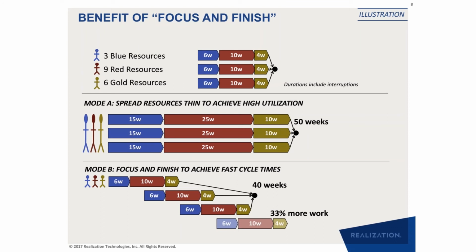what we should strive for when we are creating a project plan for a single project in a multi-project environment is to achieve the duration that is dictated by the critical path. That is how we should think about resourcing a project. And again, critical path, you said, duration that is dictated by critical path. Is that correct? Yes, we should try to achieve that duration when we do the project plan in critical chain. Right? Which means having enough resources so that you don't have resource contention in a project. But if you do have resource contention inside a project, then you should do staggering within the project of different legs of the project. Right?